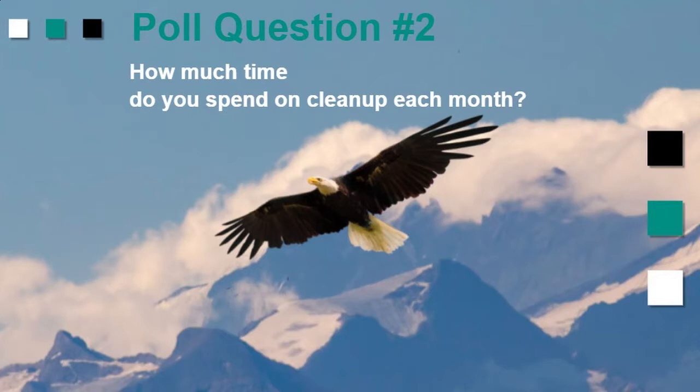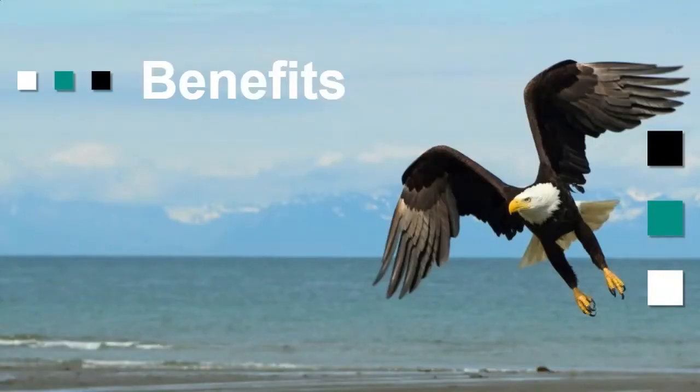Really it comes down to keeping your system clean, and there's a lot of benefits to having a tool that will pre-scrub. We talk a lot about pre-cleaning. The other thing, if you're a contractor, you may not want to send all of your data out with the XER that you're putting out. So there's a benefit as a contractor to pre-scrub before you give the XER. So it's on the export that you're making.